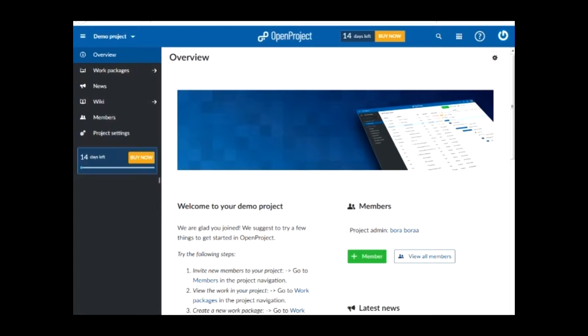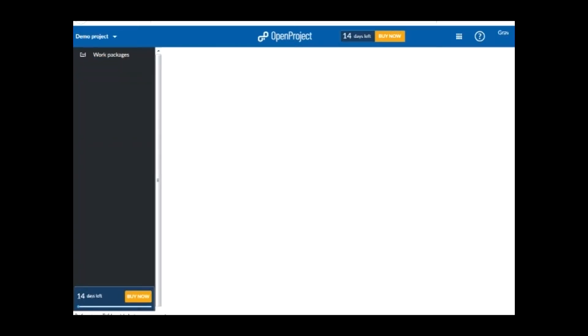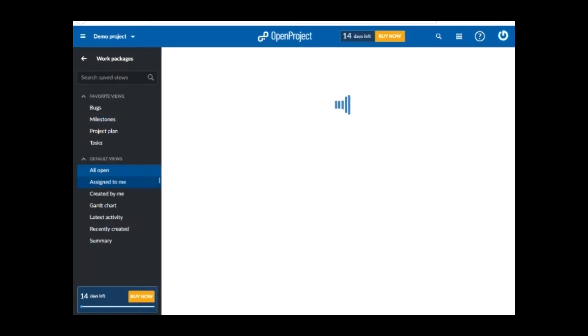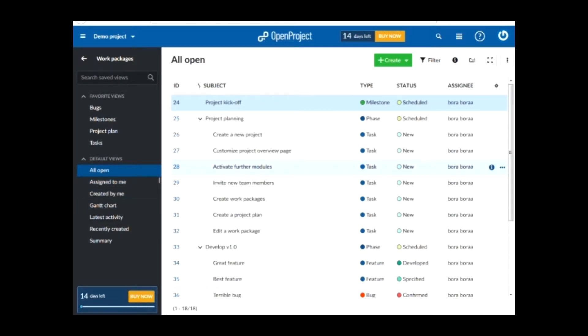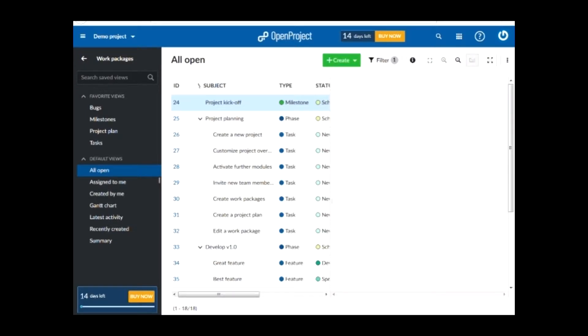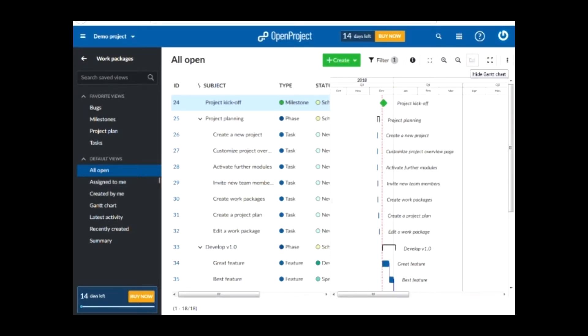Gantt chart helps visualize the task and the workflow of a project. You can find Gantt chart by clicking on the work packages and then scrolling down the left menu and finding the button that says Gantt chart. Or you can either press on this button here that says show Gantt chart.